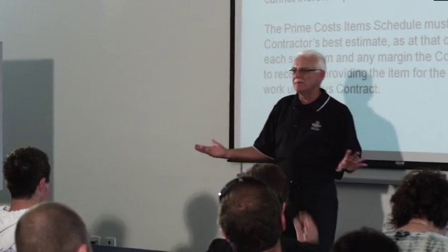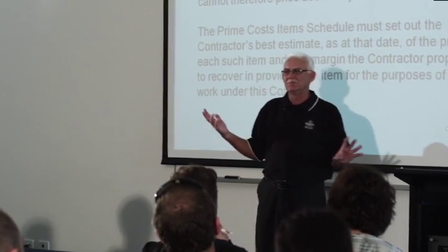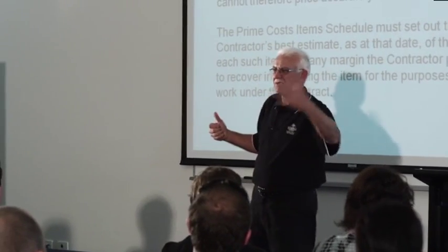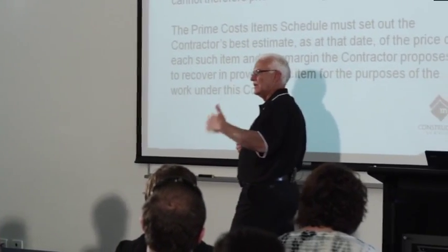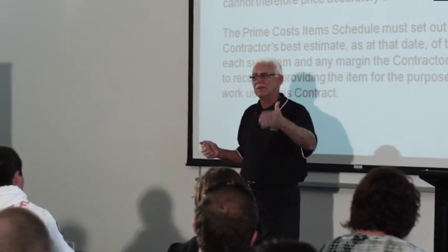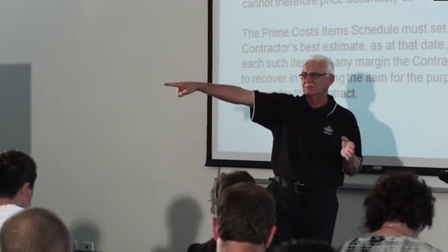Again, guys, don't try and make money out of PCs. You'll come unstuck all the time. Make the money out of your supplier giving you it at a good rate. But when you put it in as a PC, make sure you put it in at retail price, because that's what the owner's going to see when they get to the factory.